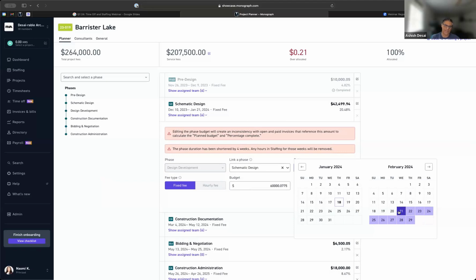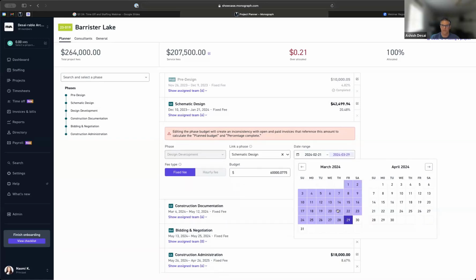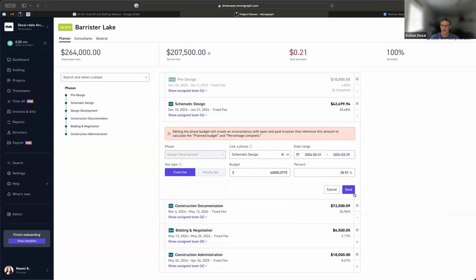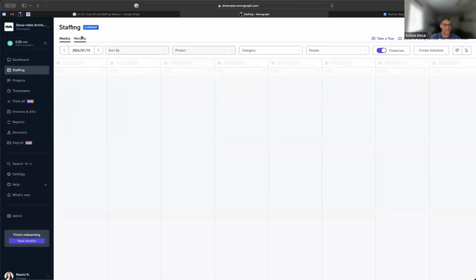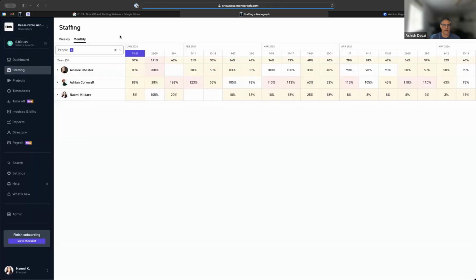One thing, this is a little bit in the weeds, but if you change the duration of the phase, then of course, we are going to have to cut off the hours that were stored. I'm just going to make sure the duration's the same, so we don't have to get into that. But basically what this is going to do, you'll see in a second, is move all those hours that I had created and showed you and move them out into the future. So they should be in the week of February 22nd. Doing this live, so you never know what happens.